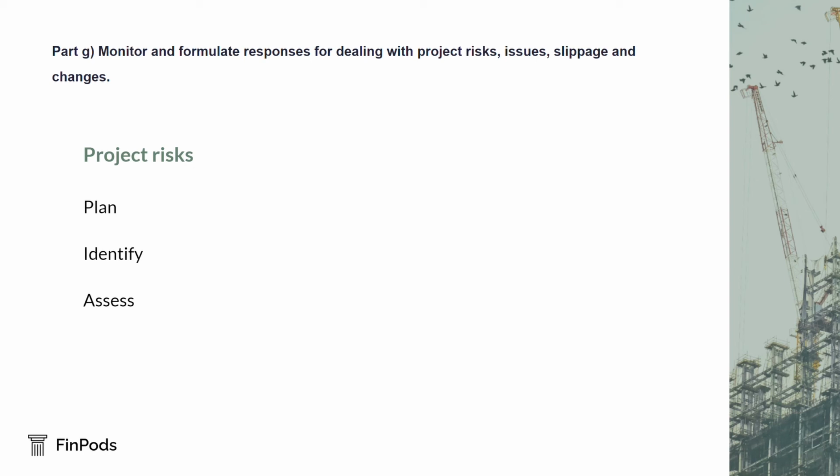Stage 4. Plan and record risk responses. There are 4 strategies when dealing with risk: avoidance, where activities that could carry risk are not performed or are removed from a project. For example, an acquisition is rejected because of the potential legal liabilities attached to the potential acquisition target.